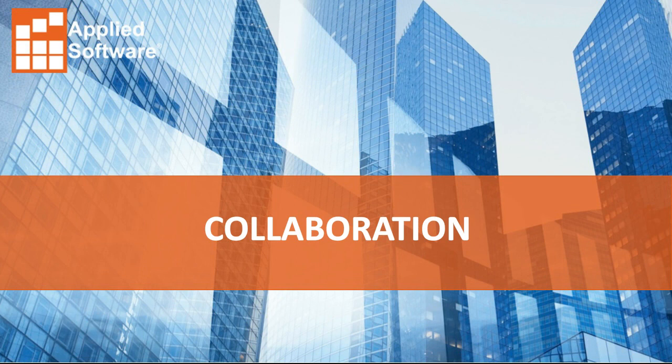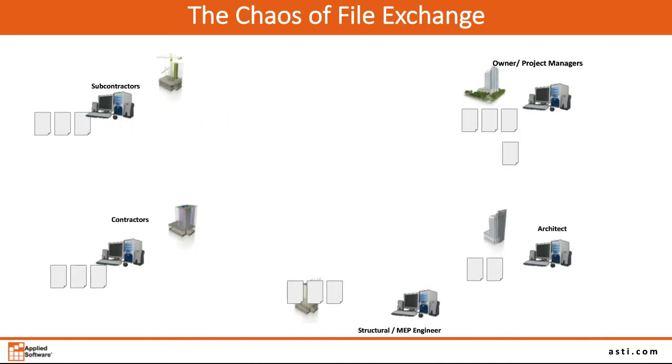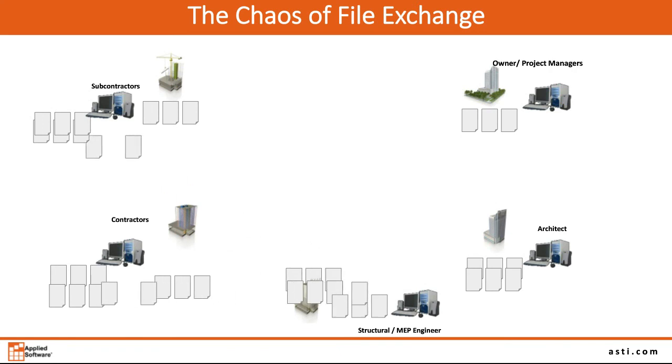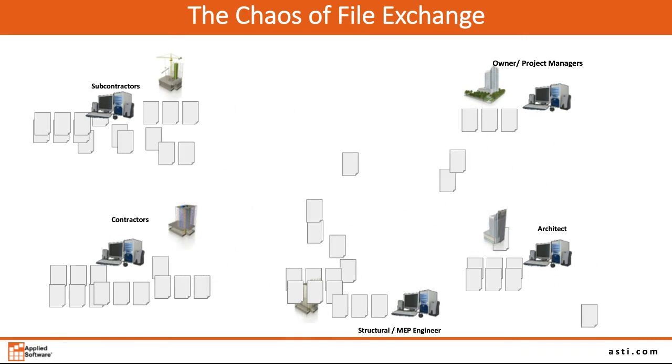And if we look at traditional collaboration, people share files using email, FTP sites, and you're really kind of dependent on making sure that someone is emailing the correct version of a file to the correct people, or if you're uploading things to an FTP site, people are downloading the correct version, and inevitably people are starting to work with different versions of the project files, and chaos ensues. That's just something that typically happens on a project using traditional, outdated, what I call analog methods of collaboration.